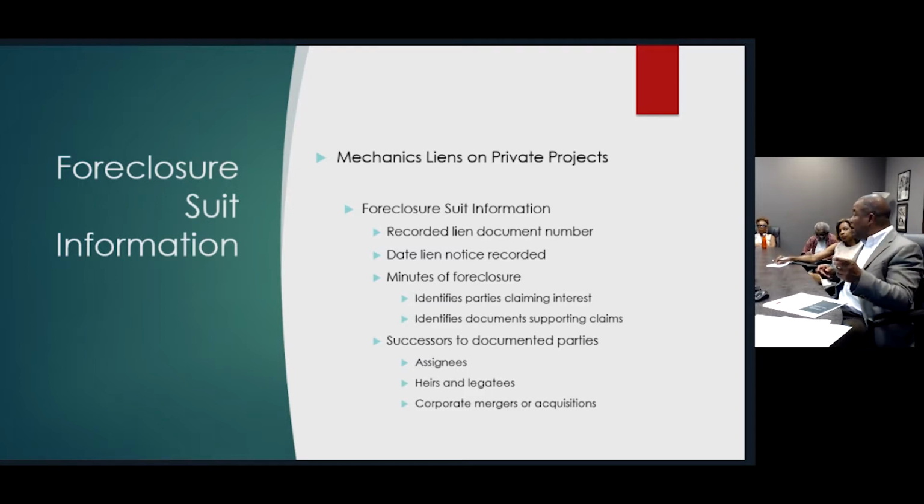And it's possible that a corporation has purchased this land. So you need to check the records to see if a corporation has purchased that property and if they've been merged with another business. All parties, all interested parties must be included in the suit. The failure to include any particular interested party could void your suit. That's why the recorder of deeds will give you all of this information. The recorder of deeds, and I'm trying to think of some other sources in which you will get that information.